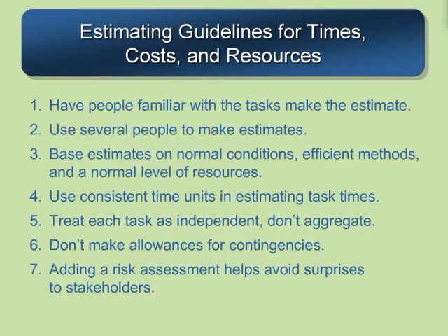Here are some general guidelines you should use for estimating times, cost, and resources. You may want to check with others that are familiar with the task and have them make the estimates. If it's something that a few people know about, maybe you do a poll or ask a bunch of people what they think, and then from that make your best guess.